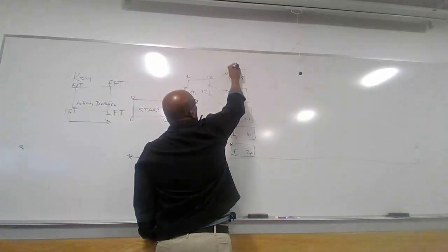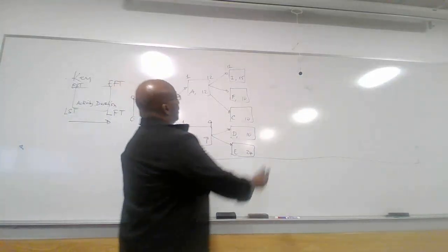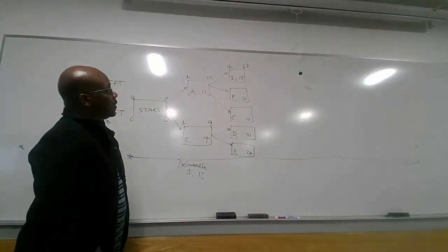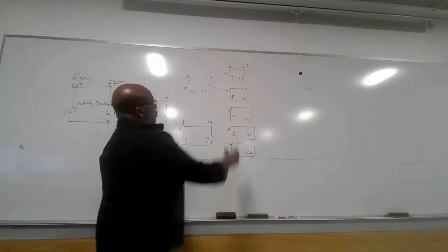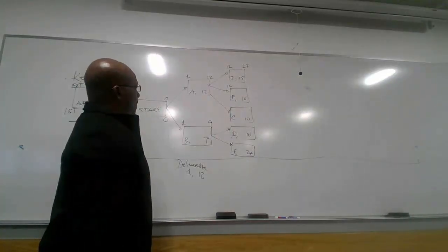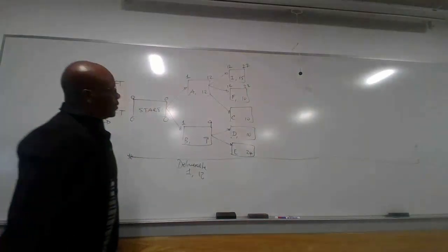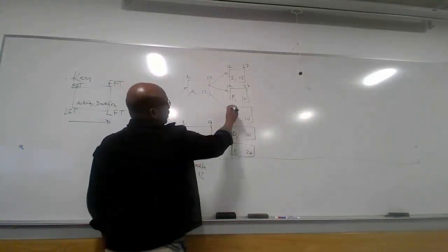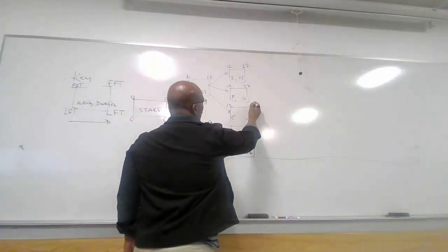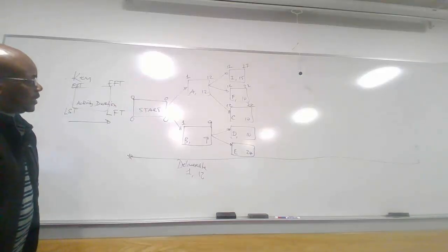So in this case, we're going to start on the 12th when we know that A will be completed, and it is going to take 15 weeks. So here will be 27 weeks, up on the 27th. And so here we will start also on the 12th when A is completed. And so we're going to add 10, will be 22. C will start on the 12th, and also that will be 22. Or on the 22nd, that's when we are going to finish that activity.